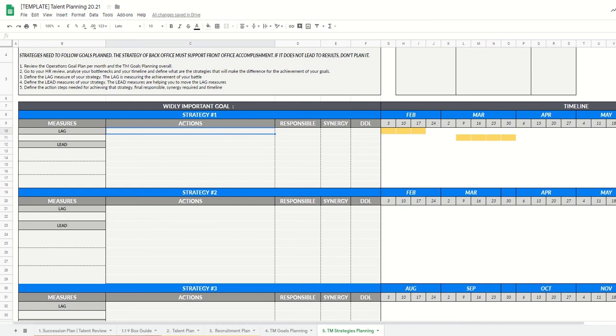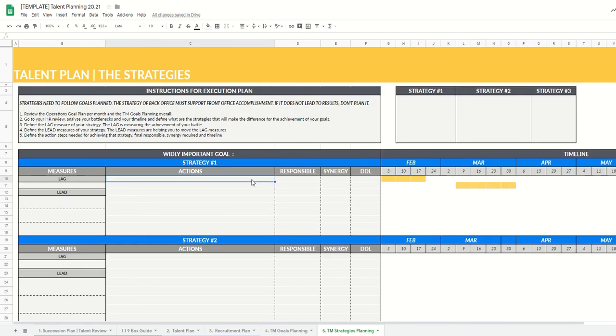The last thing I want to say is that the actions need to be actual actions, things that you do, where you are moving and doing. What do I mean by this? It means I cannot put as a task, for example, NEC, because NEC is not an action, it's a thing. So what would be part of NEC? It would be: create the NEC quiz tool, for example. Create the NEC quiz. Create the NEC tool to track the quizzes.